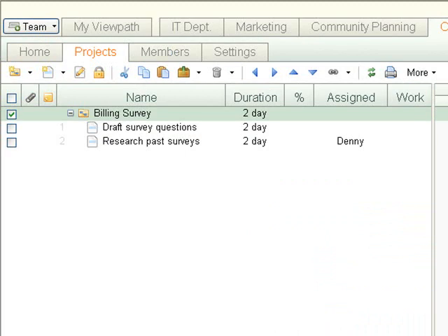On a side note, it's often a good time management practice to factor in schedule buffers in planning task durations. This way I have a realistic scheduling picture that's often different from estimated work hours. For example, I roughly estimate this task will take 3.5 hours of actual work. However, I schedule 2 days duration to allow scheduling flexibility for a team member who's managing multiple priorities. Notice that work hours also automatically roll up in the hierarchy, so if I decide to include work hours in my planning, I'll see an auto summary of estimated hours at all levels of my project.